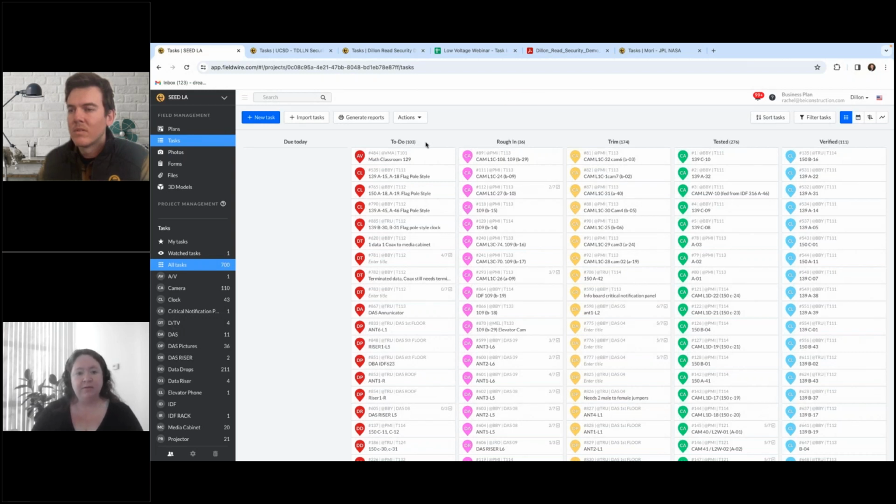So for this one, typically we're going room by room. So we have very rough breakdowns of these statuses to display exactly where we are in each room, so that as soon as we finish one certain part of our scope, then we can have these other trades come in to follow us, drywall contractors, painters, etc.